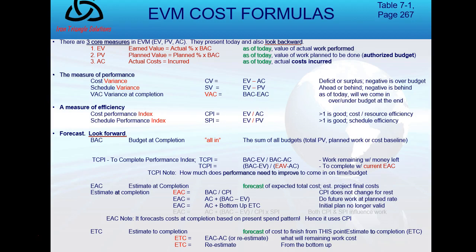And then I'm going to look at performance measures, and I have three. Cost variance we talked about, which is, notice EV is always first. Earned value minus AC. It's a variance. It's negative. Schedule variance, EV minus PV, the plan value. And variance at completion. We already addressed that. And on the right, you see the definitions or some rules that are important. Then I want to talk about measures of efficiency. We already addressed those. This is just a review.